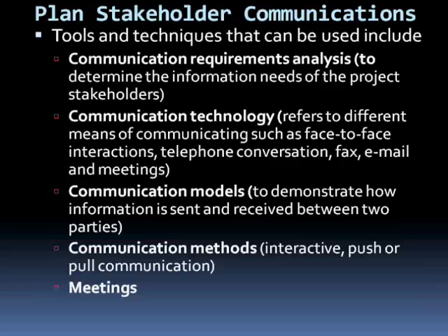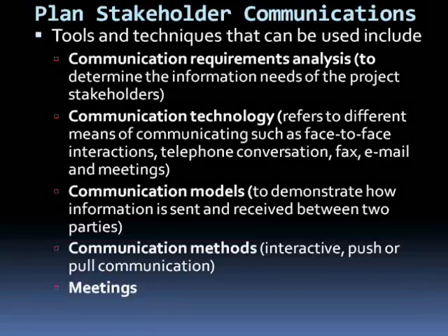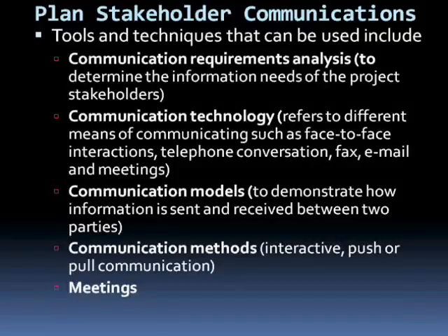And we could apply various communication methods, such as interactive communication, where there is a two-way exchange of information, or we could use a push communication, which is one way towards the recipients, or pull communication, where the various recipients rather access the required information from a certain repository.